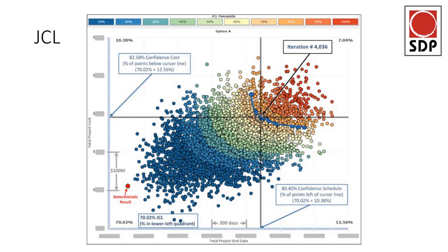This actually comes out of a NASA, I think it's Annexure J of their cost estimating handbook, and you can see how the two cost and the schedule elements are slightly out of whack. In other words, for cost at the bottom, I think that's an 80%, and at the top for schedule, if I'm not mistaken, they've got an 82% confidence level. And that blue line represents the J70 curve at which they will approve.